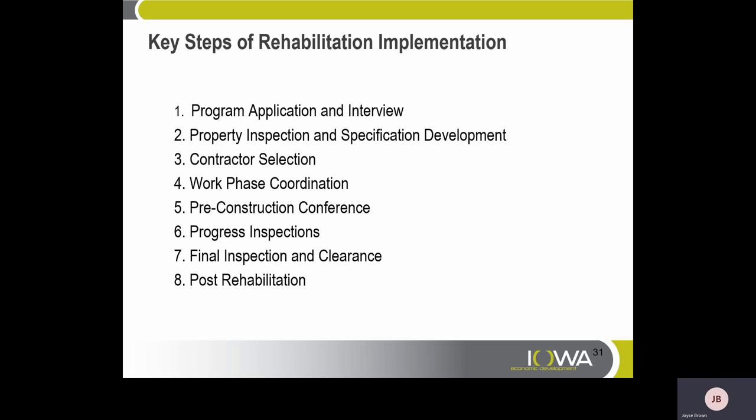Key steps of rehabilitation implementation — there are eight. One: program application and interview. Two: property inspection and specification development. Three: contractor selection. Four: work phase coordination. Five: pre-construction conference. Six: progress inspection. Seven: final inspection and clearance. Eight: post-rehabilitation.